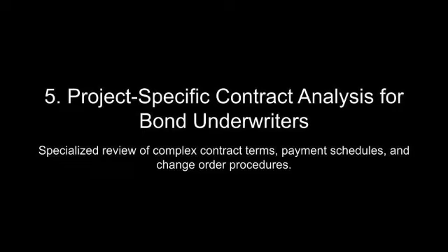For example, in jurisdictions where courts are unlikely to enforce punitive damages, overly aggressive clauses may invite disputes, delaying payments and project progress. Sureties must analyze not only the penalty amounts but also the mechanisms for assessing and resolving disputes, as these factors directly influence bond liability timelines.